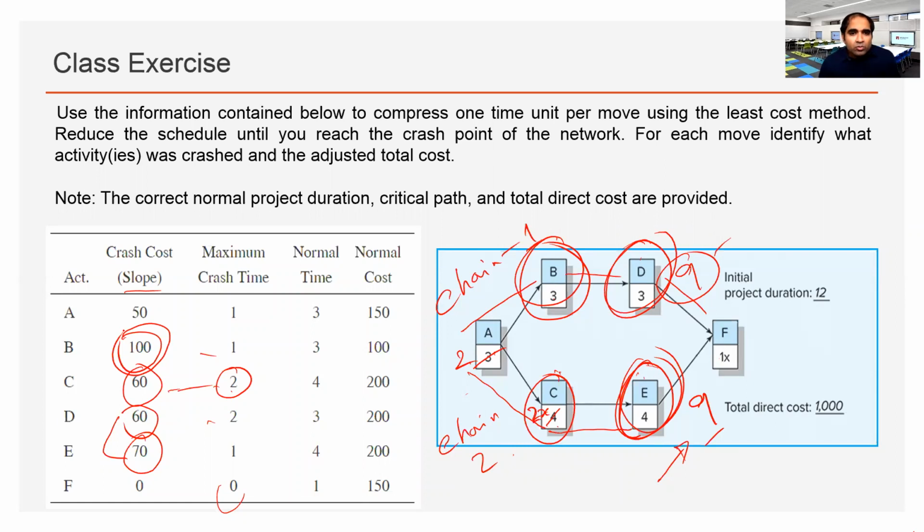Do we know the total amount that is allocated for the project? I mean, again, this is another critical question. If we are restricted by money, we should not even be looking into reducing the project duration. Another answer is, once you have this information, you present it to the top management: reducing by 1 day will cost this additional amount. Are you happy for us to proceed? So the top management have a clear idea about the total cost related to the project reduction.